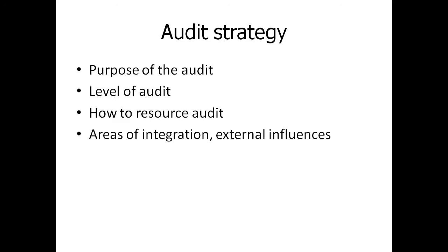So being clear about the purpose of the audit and the level of the audit required, the next thing we need to consider is how to resource the audit. So resourcing the audit really means how many man hours, what type of management process, what type of software, what type of data management, and how is this going to be maintained as well. That's always a problem with longevity studies and life cycle studies, is maintaining the accuracy of that information and ensuring that when we go to look at it next year, that it's still relevant.